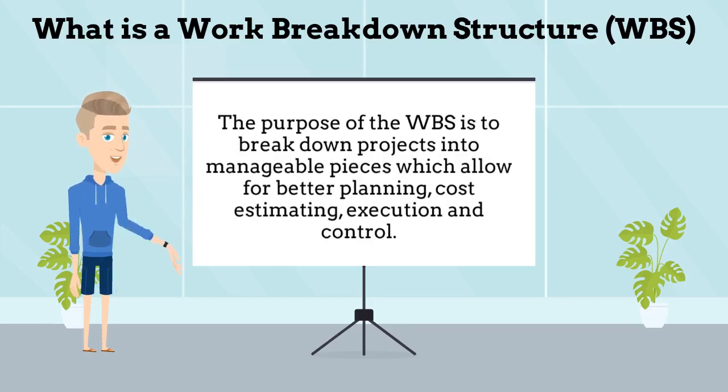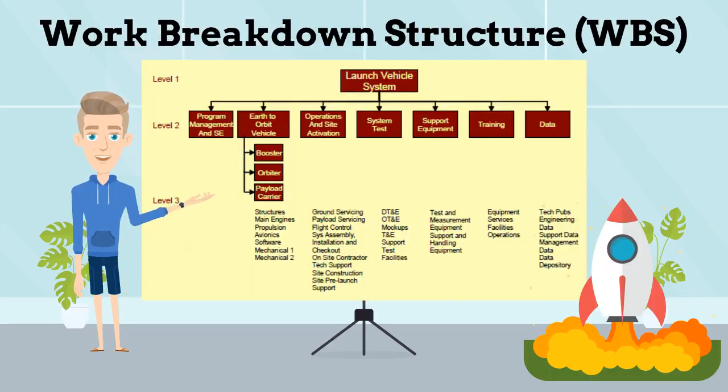The purpose of the WBS is to break down projects into manageable pieces, which allow for better planning, cost estimating, execution and control. Here is an example of the work breakdown structure from a rocket program. This WBS shows the first three levels of the rocket project.